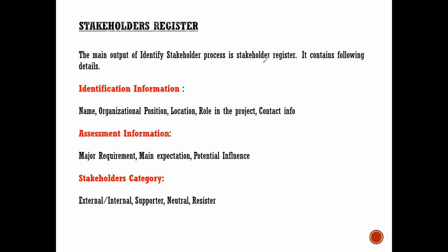Now, how do you define GUPI? Let's see. This is an acronym which includes all the stakeholders of the project. In GUPI, what does G stand for? G stands for governance. In governance, who all will be included? The steering committee, the project board, sponsors, right? And U in GUPI is users or beneficiaries.